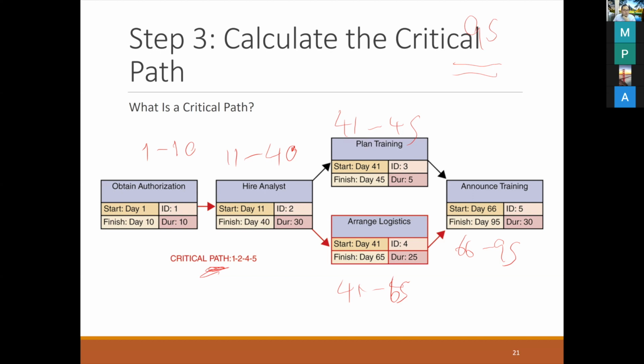that we have to conduct the meeting frequently is because if we conduct the meeting every week, that means on day 7 you already know whether the person who is responsible for task number 1 will be able to finish within another 3 days or not. Day 14, you conduct the meeting here. Day 21, day 28. So we slice the time and conduct the meeting so that we know how it's going for each task, whether it has any problem or not.